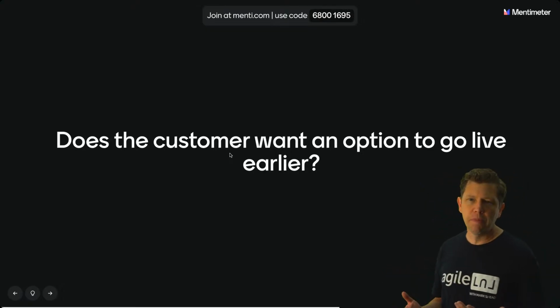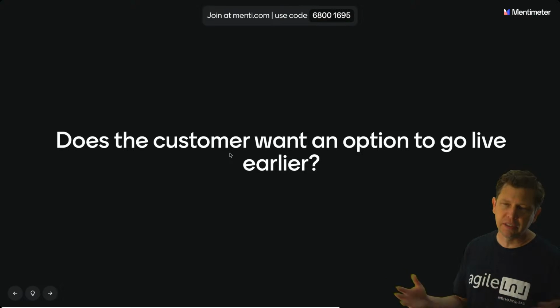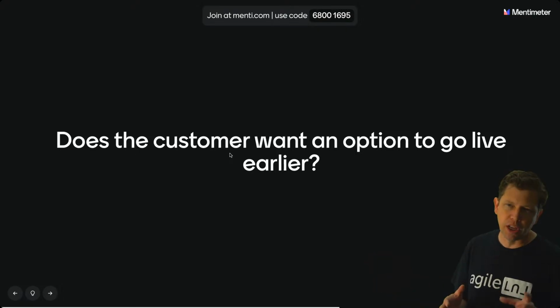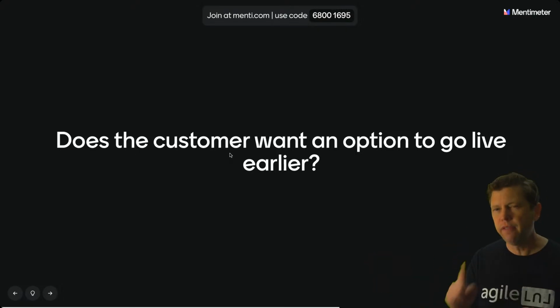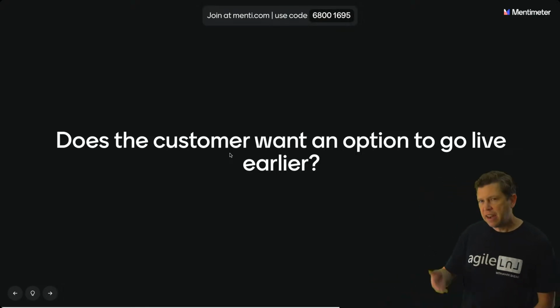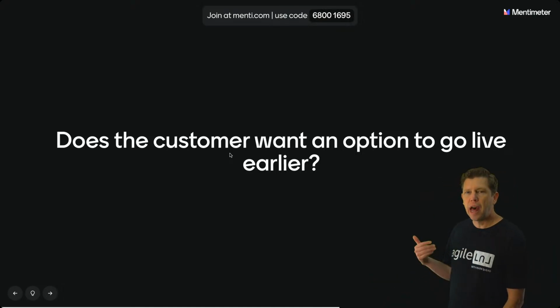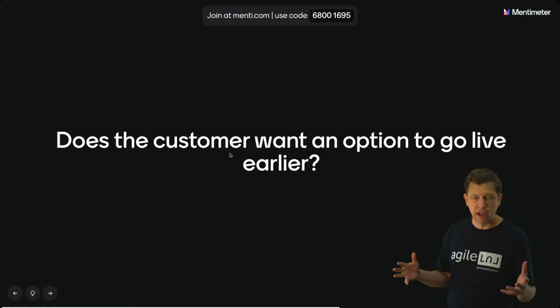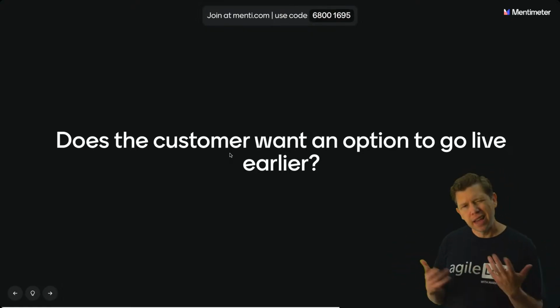everybody got sent home because of a pandemic and the entire team's sick for some reason. If that was delaying the date past a certain point, would you be willing to say, okay, there's at least one feature that we wanted that we're willing to go live without? And if that's the case, would you like the option to be able to go live without necessarily having to have everything done? And usually you can get people to say, yes, that option would be nice.